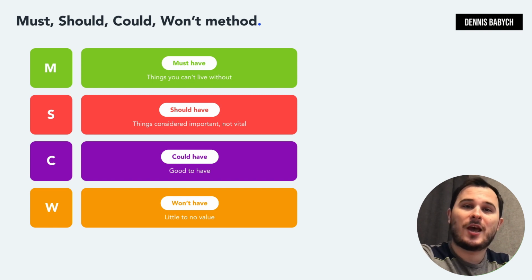Okay, once you have thoroughly researched your competitors, identified all your customers' problems, and generated a range of solutions, it's time to properly prioritize your software features. You will need to decide what features you must, should, could, and want to develop. This methodology effectively creates a framework of key features required for swift development and proper prioritization. On top of that, it helps you to pivot if needed with limited resources. Also, it helps you to identify your prime path and crystallize your project's fundamental goals.